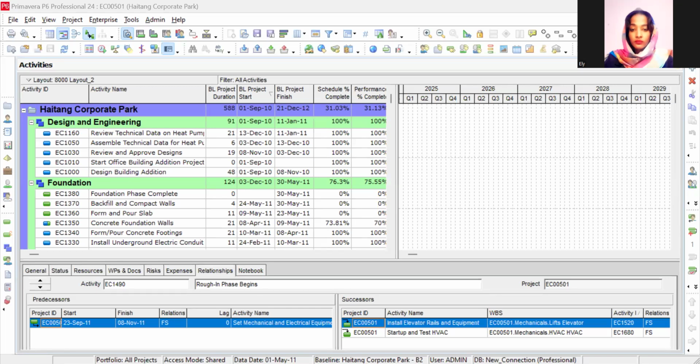Today, our topic is resources. Resources are divided into three categories. What are the resources? Resources are the manpower. What is manpower? Manpower is direct or indirect labor that is used to accomplish the project activity. So, for example, if I want to construct a wall, then I need three masons or two laborers, two helpers. So this is the manpower requirement to achieve this activity.